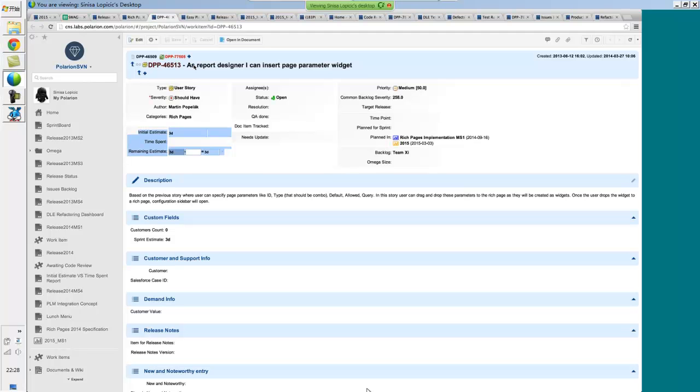So what that means is that before the work commences on something, we have a couple of reality checks in place to see whether we are still making sense around this work and what we're planning to do, or whether we need to make additional adjustments to the project, to either manage the scope or increase the resources to deliver on it.